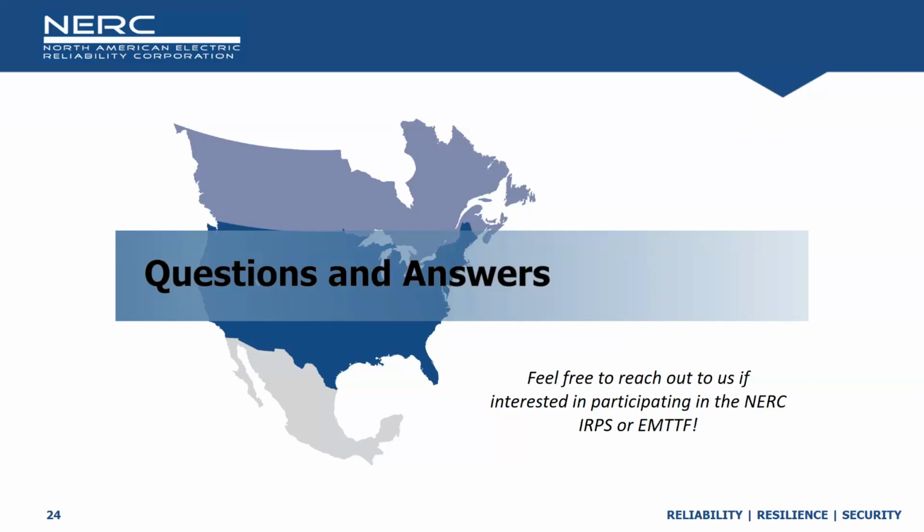So when we get into that model testing and benchmarking phase and we're running those studies, when we see the responses, and as Steve had mentioned too, when we start getting responses to all the requirements of the studies that we're performing, we relay that back to the OEM and we say, here's our setup, here's what we're doing. Do you agree with the parameters we've set for this study? Looking at it from both the RMS domain and the EMT domain, we get similar results across the board for the same studies that we're performing. Are these parameters in line with what you expect to be capable of implementing and would potentially implement in the field, basically creating that communication as early on as possible with regards to those?